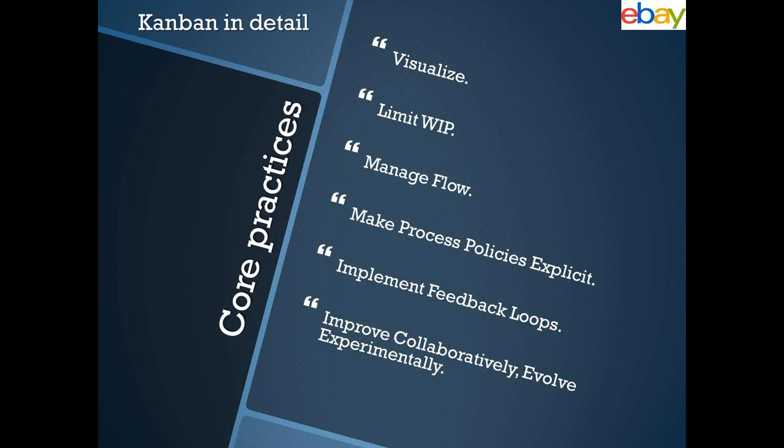What does evolve experimentally mean? For example, let's say work in progress starts at two, and we find that some engineers are not occupied — we can increase that to three and see what we can do better.